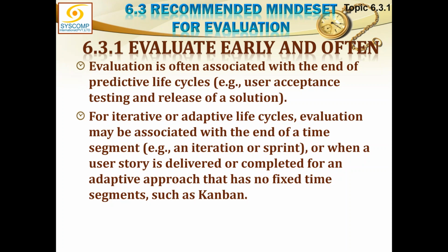For iterative and adaptive life cycles, you understand that the user acceptance and solution delivery, the releases are continuous in nature. So this is a continuous step. Evaluation may be associated with the end of a time segment and an iteration or a sprint. So every iteration and sprint goes through the user acceptance and the release of the part of solution. Or when a user story is delivered and completed for an adaptive approach that has no fixed time segment, such as Kanban. Kanban is another example where there is no fixed time limit.